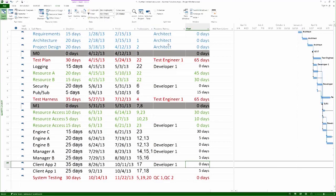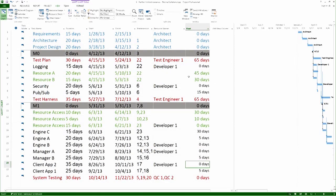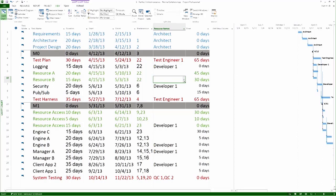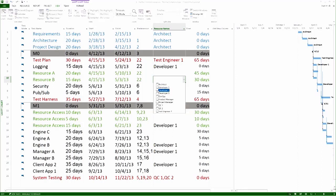Now, let's assign the second developer. Again, we look at the beginning of the project, 4.15. We can see that there's two activities. One, 30 days of float. One, 45 days of float. Of course, we always assign based on float. And so, we do the first activity, the one with 30 days of float. Let's make that be developer two.